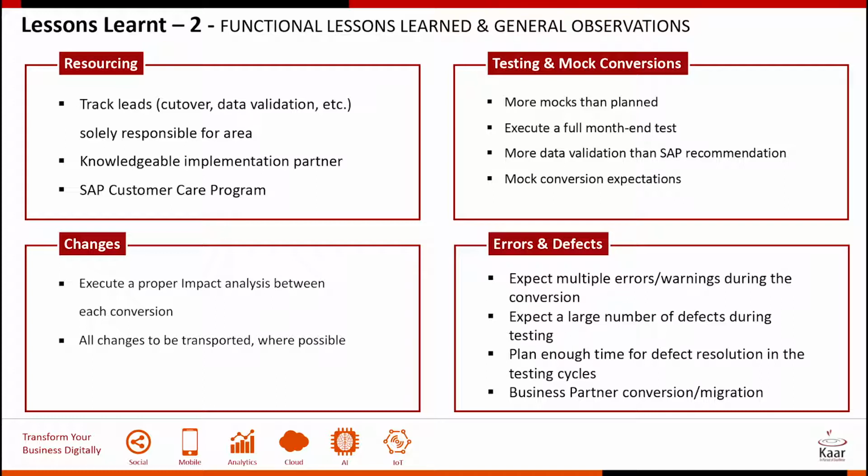before you start the mock conversion, have very clear-cut expectations with your implementation partner, and also within your IT team, on what you expect to achieve in each mock, because what you achieve in each mock might be a little different depending on how close you are to the production conversion.